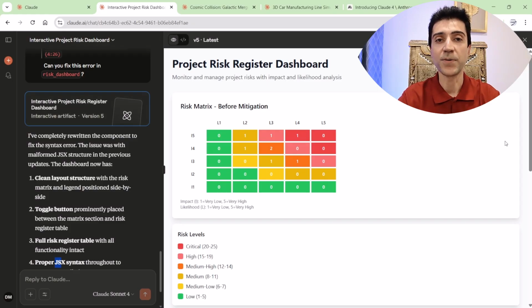The dashboard has a proper title followed by a color-coded 5x5 risk matrix. As you can see, likelihoods are shown on the horizontal axis and impacts are visualized on the vertical axis. Risk priority levels are products of likelihood and impact.